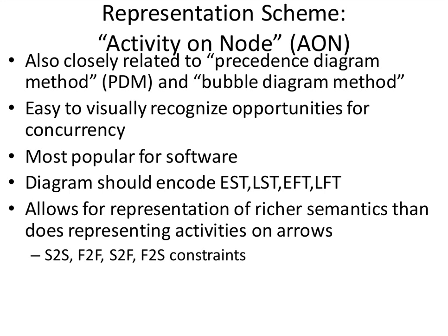Another is the late start time. Now, late start is the latest it could start and not delay the entire project. Okay? So we have early start, late start, and then we have early finish and late finish, which are corresponding values for the finish. And for our cases, finish of that activity.